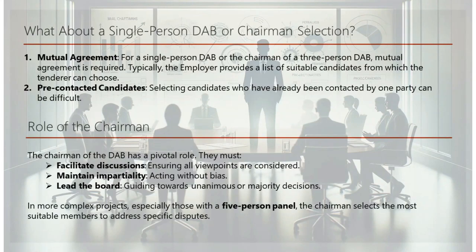For a single-person DAB or the chairman of a three-person DAB, mutual agreement is required. Typically, the employer provides a list of suitable candidates from which the tenderer can choose. However, selecting candidates who have already been contacted by one party can be difficult, as this is a common challenge in the appointment process.